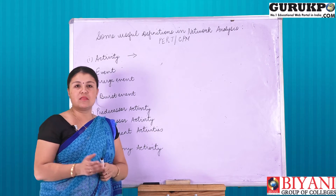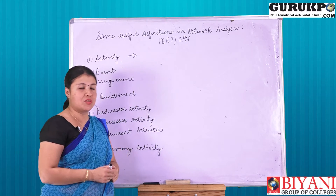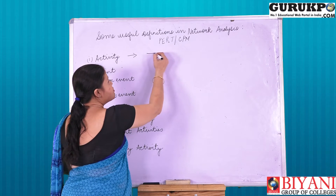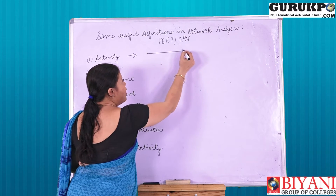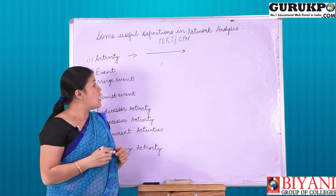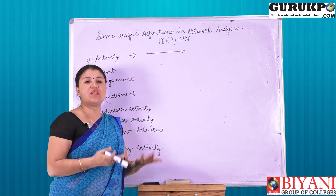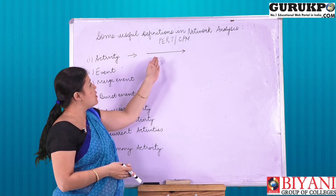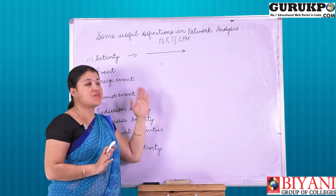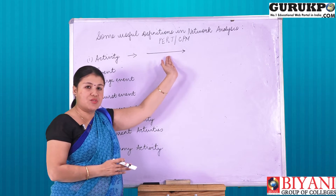An activity is an act of work that requires time and resources for its completion. An activity is indicated by a straight line followed by an arrow. The length of the line does not indicate the duration — it has no connection with the duration. Whether you have a small line or a large line, it does not symbolize the duration.